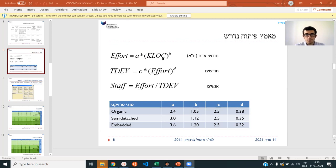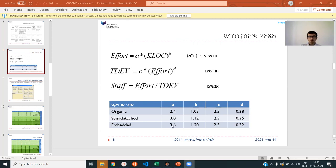The problem, of course, is how are you going to get this number — how many lines of code do you think it will be, approximately, raised to the B power, which depends on whether it's a small, medium, or large kind of software. Embedded is more complicated; organic is a small group. Multiplied by coefficient A, which also changes. C and D are used to convert effort into how many months — if it's 100 man-months, we don't know how many months that is, because it could be one month with 100 people or two months with 50 people.